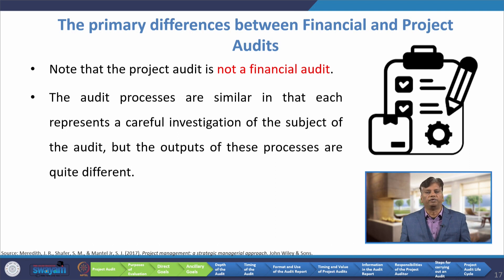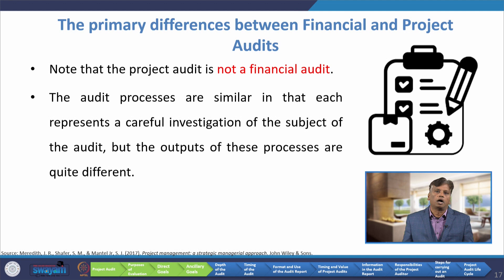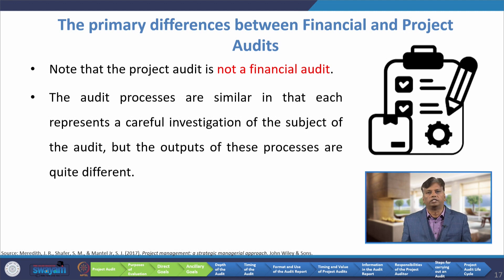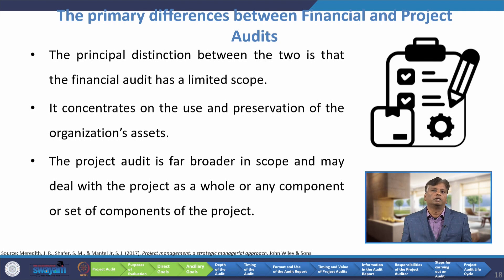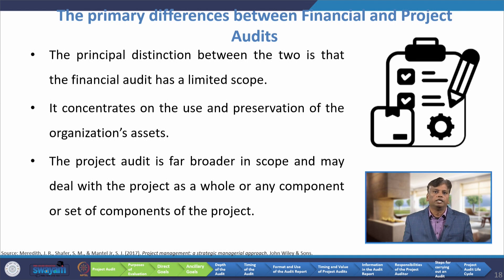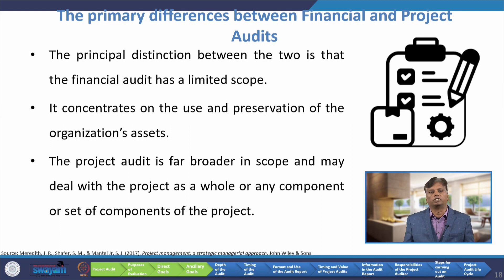Now we will discuss about the primary differences between financial audit and project audit. Note that the project audit is not the financial audit. The audit processes are similar in that each represents a careful investigation of the subject, but the output of these processes are quite different. The principal distinction is that the financial audit has a limited scope — it concentrates on the use and preservation of the organization's assets. The project audit is far broader in scope and may deal with the project as a whole or any component or set of components of the project.